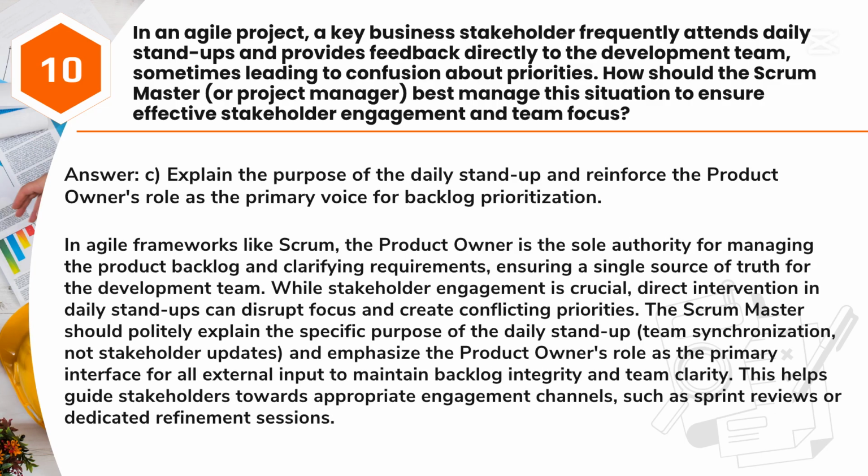Answer: C. Explain the purpose of the daily stand-up and reinforce the product owner's role as the primary voice for backlog prioritization. In agile frameworks like Scrum, the product owner is the sole authority for managing the product backlog and clarifying requirements, ensuring a single source of truth for the development team. While stakeholder engagement is crucial,